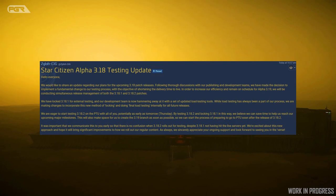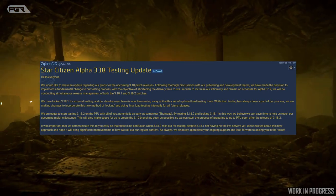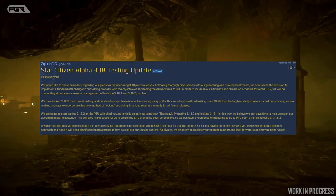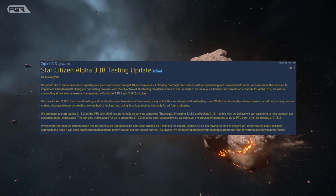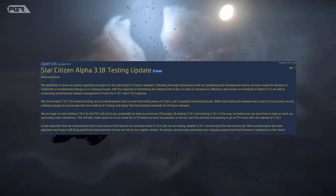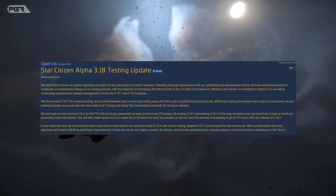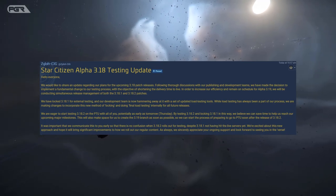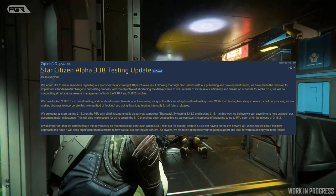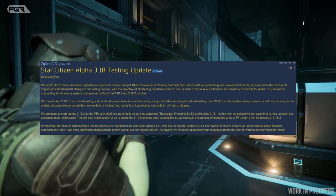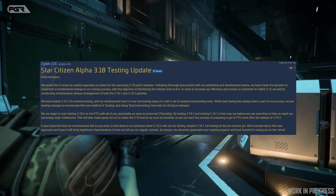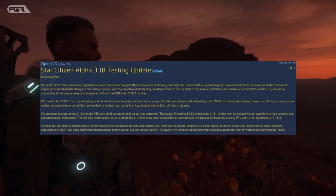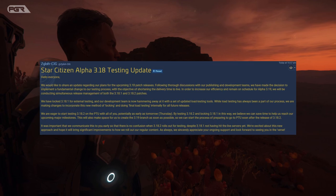We're eager to start testing 3.18.2 on the PTU with you all, potentially as early as tomorrow, which is Thursday. By testing 3.18.2 and locking 3.18.1 in this way, we believe we can save time to help us reach our upcoming major milestones. This will also make space for us to create the 3.19 branch as soon as possible so we can start the process of preparing to go to PTU sooner after the 3.18.2 release.